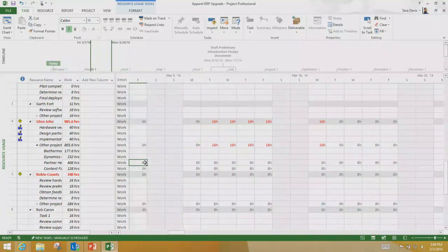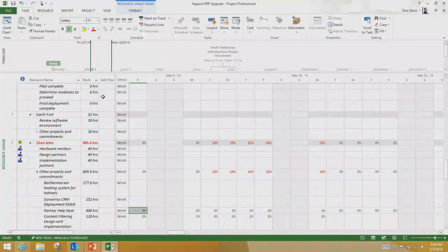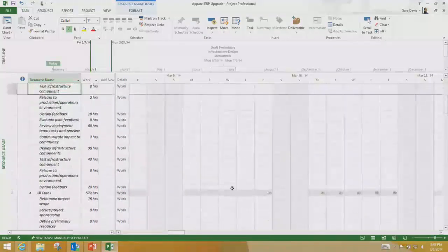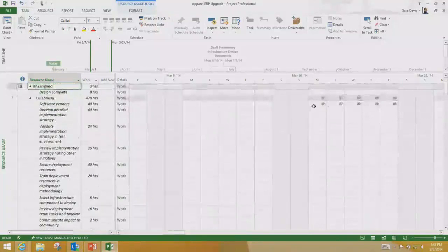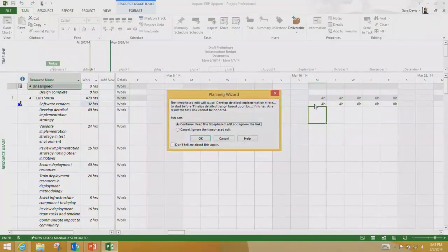So again, it helps me solve the issue. And one of the other things I pointed out earlier is you can not only see the time phase data, you can update it. So let's take this one. Actually, I need her to work 4 hours, and then 8 hours just for this project. The first parts, we only need half a day on it. Maybe I'll have her do some other work at this point, like this one. So I have this.